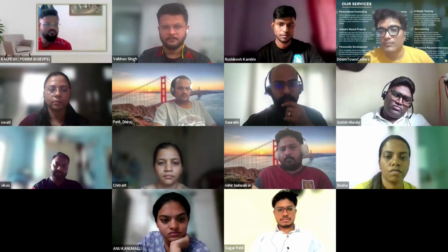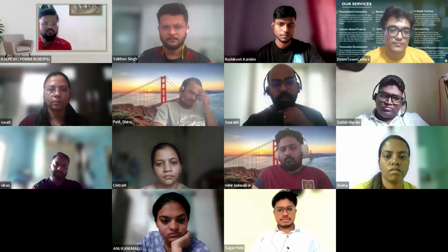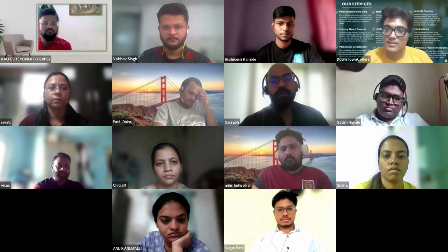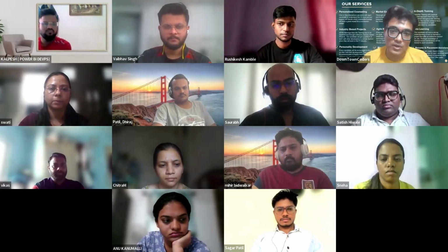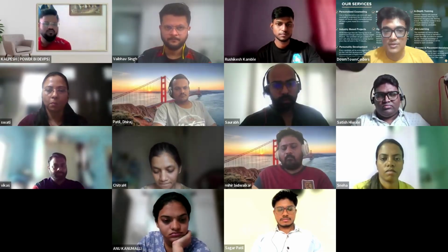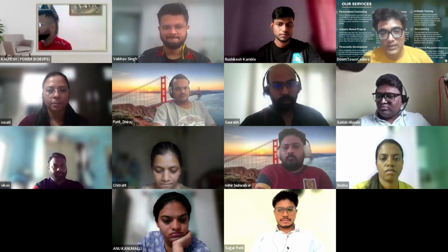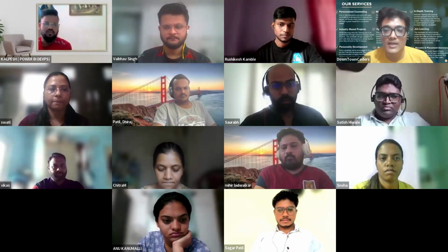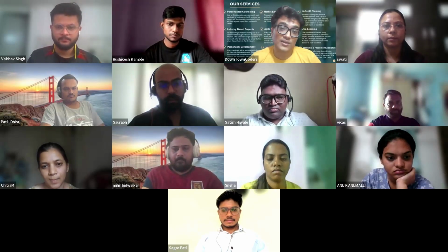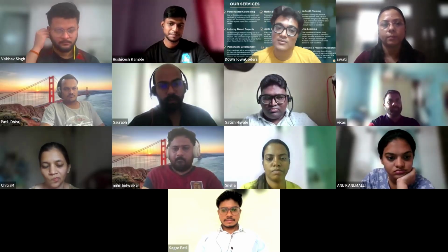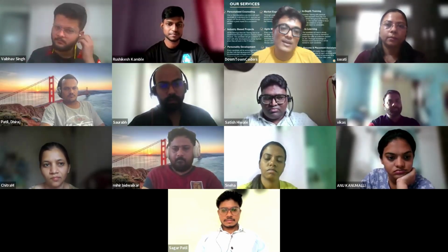That means I need more resources. Simple, right? Work has increased, I need more resources. So if you are handling larger story points than your capability, it gives an indication to the business that I need more developers now. Simple as that. And vice versa: if you are handling fewer story points, your business will lay off people.